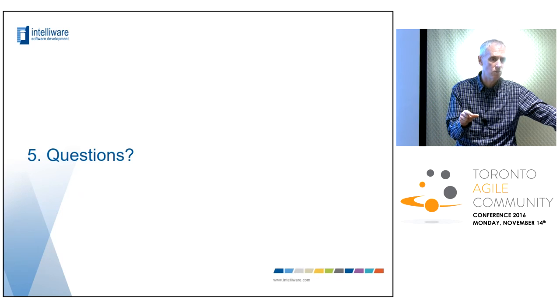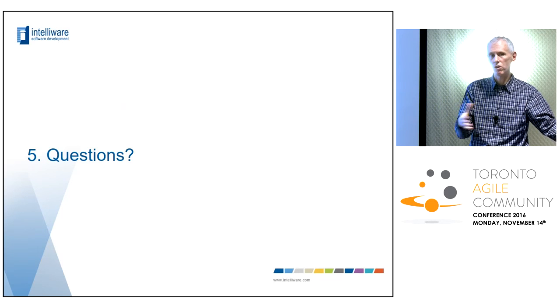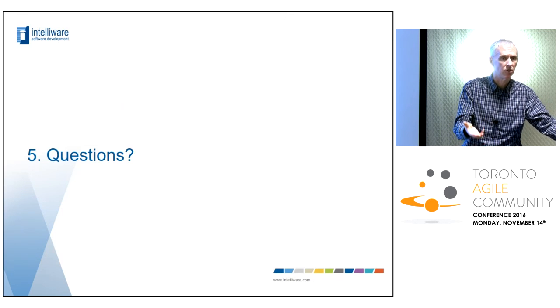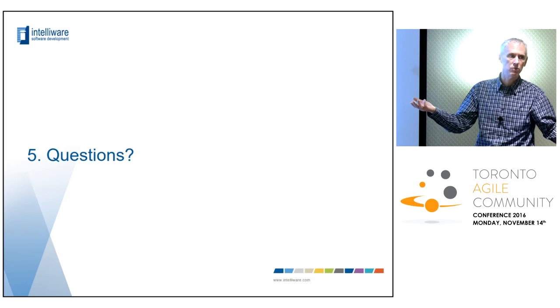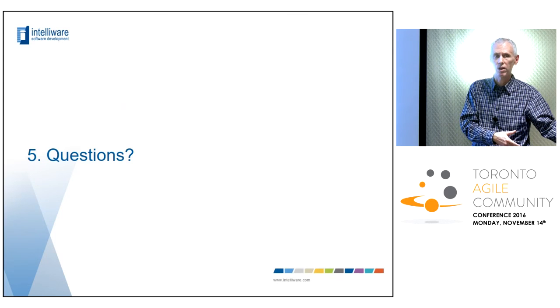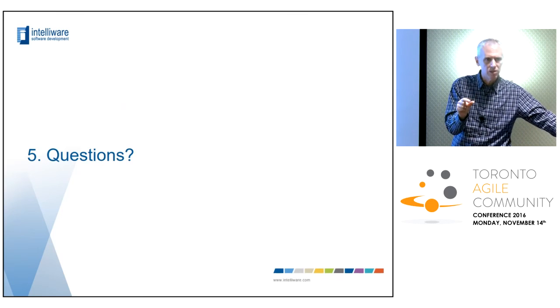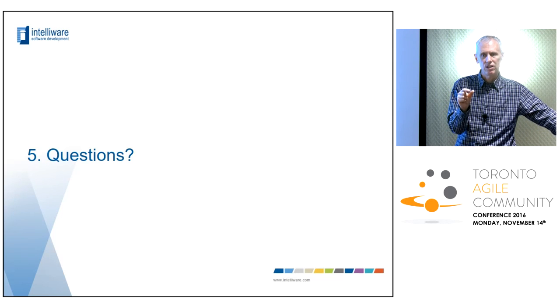Okay, that formula didn't work. We create a new story with a new estimate for the new formula that goes in. The new story, of course, will be net smaller, but you're recognizing that a requirement has changed, right? As opposed to what that team did, which was try to fix something that clearly went into the requirements wrong in the first place. So there's stuff that your business analyst and your analysis step can control, and there's stuff they can't control.